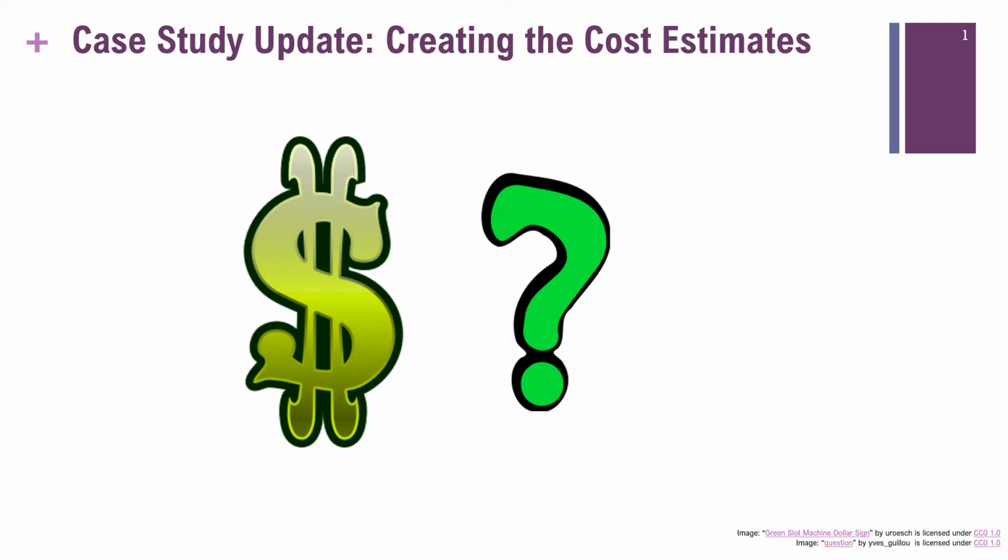The majority of the costs for this project will come from the people working on the project in the form of their salaries. At Deco Productions, the finance department has calculated what is known as a loaded rate for employees who work on projects. This loaded rate is an hourly rate that includes not only their salaries, but also reflects overhead costs, such as benefits, building costs, and office supplies.